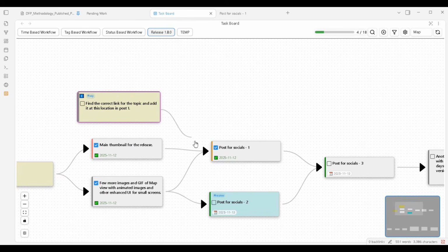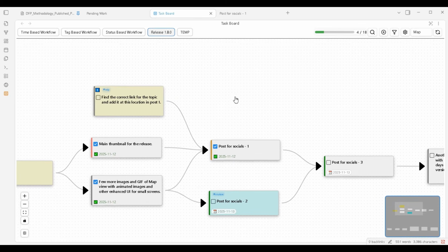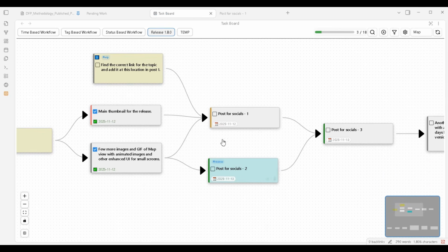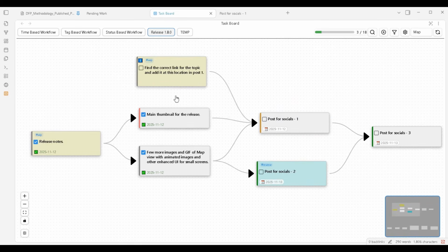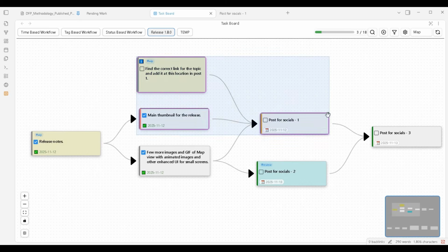Now, we have to add it here and we'll link this new task as a child task to this currently work-in-progress task. And we have to change the progress of this task to on hold, and the status of this new task will be changed to work in progress. So, as you can see now, the map has been easily changed without affecting the rest of the map, and we also have added the necessary restrictions to easily orient our flow. Again, if you want, you can keep this parent task status as work in progress itself, since it's a bigger part of this child task, but the restriction will always remain that this parent task cannot be completed until this child task has been finished.